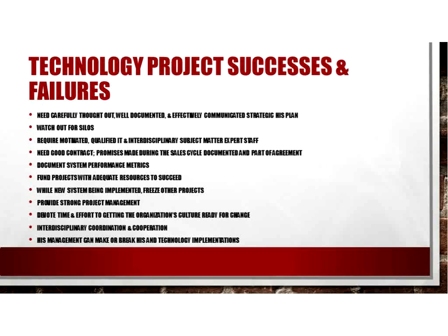Milestone and payment schedules. We talked about that over and over again. Always define your performance milestones in your contract. Product lifecycle support. Negotiate an agreement that includes, as part of your software license, new releases and versions of the software for at least 10 to 15 years. Include all your updates and upgrades in your license and support fees. Scope of license.